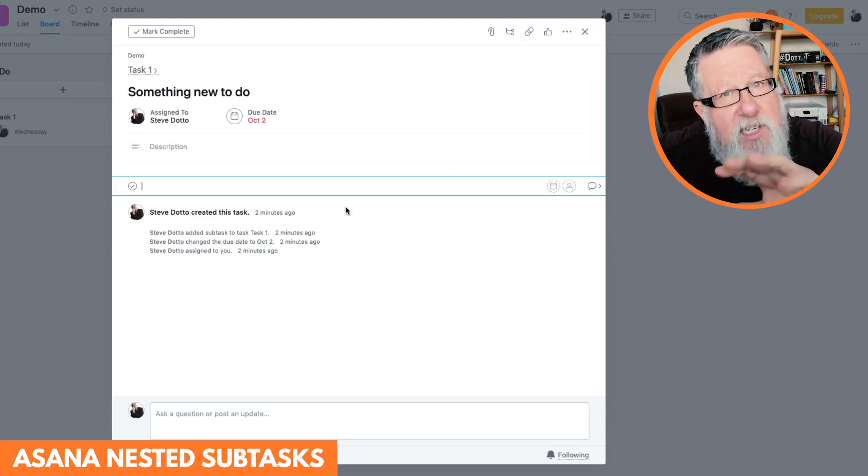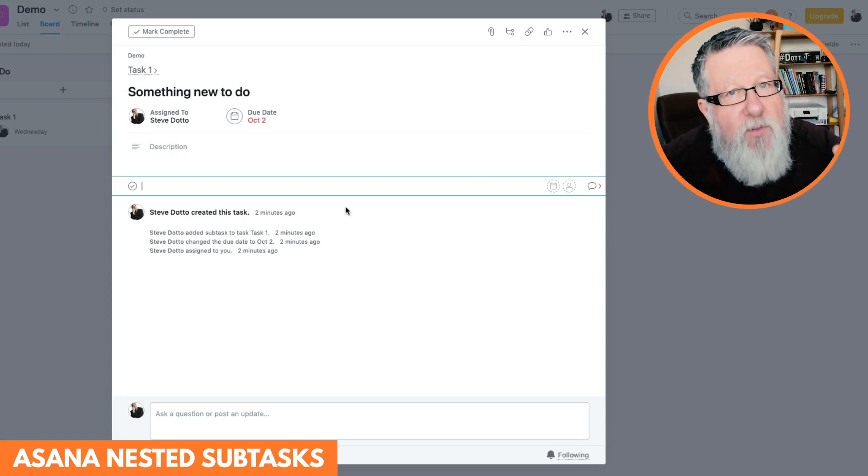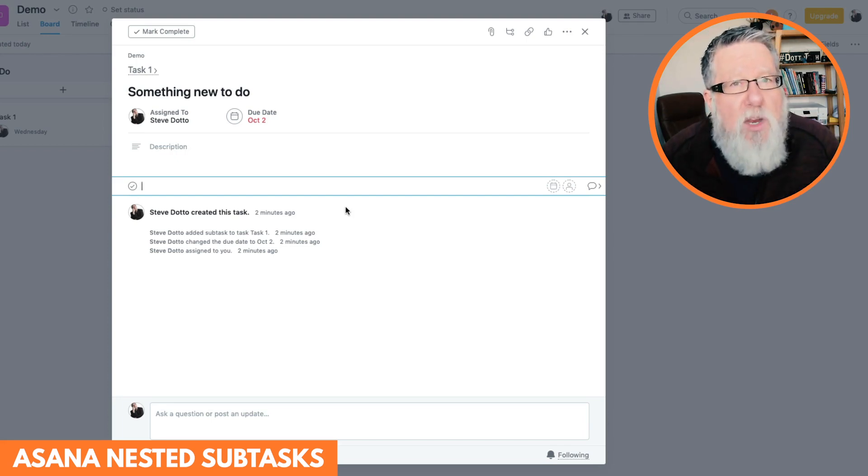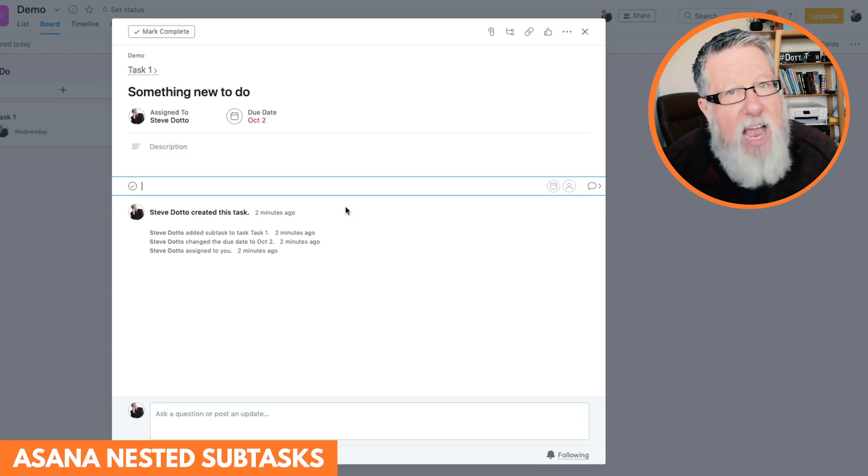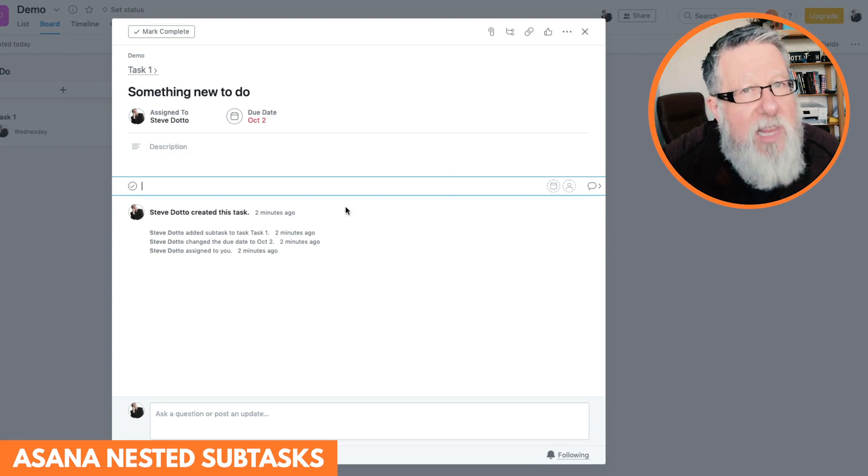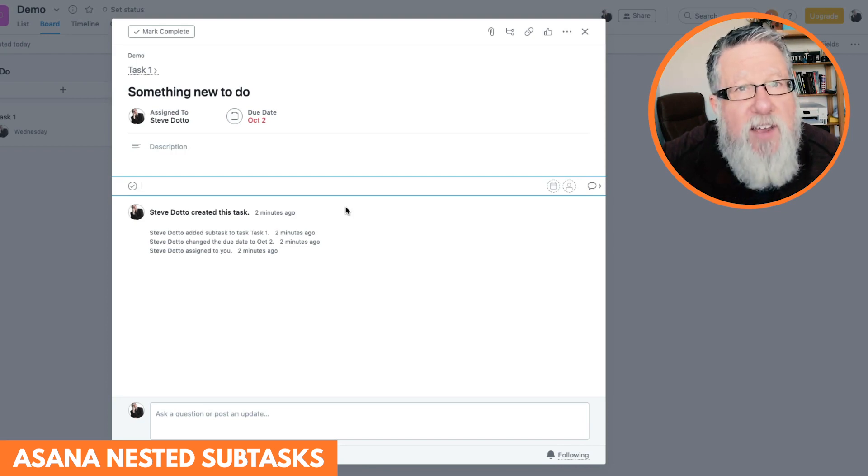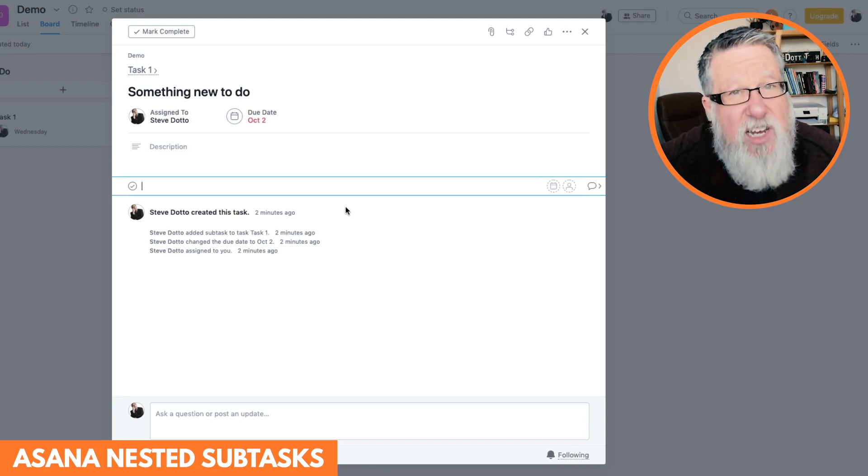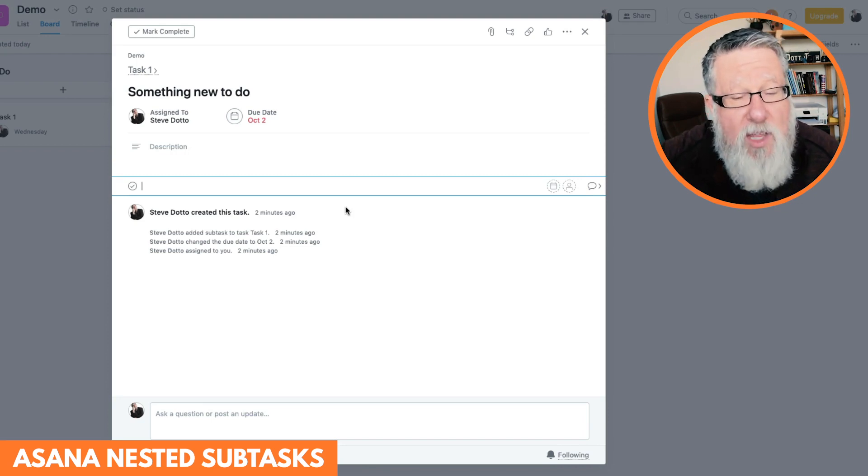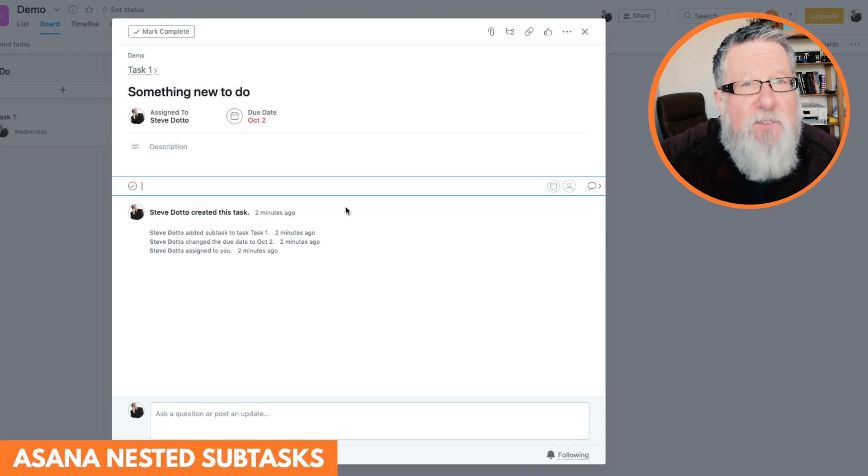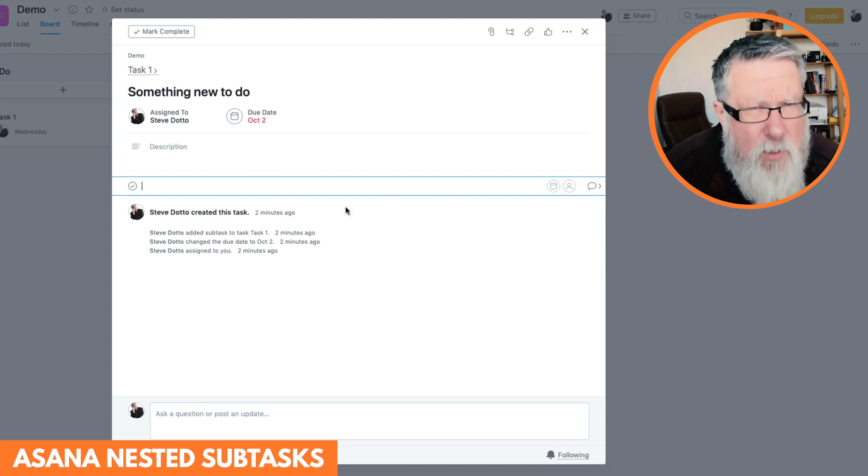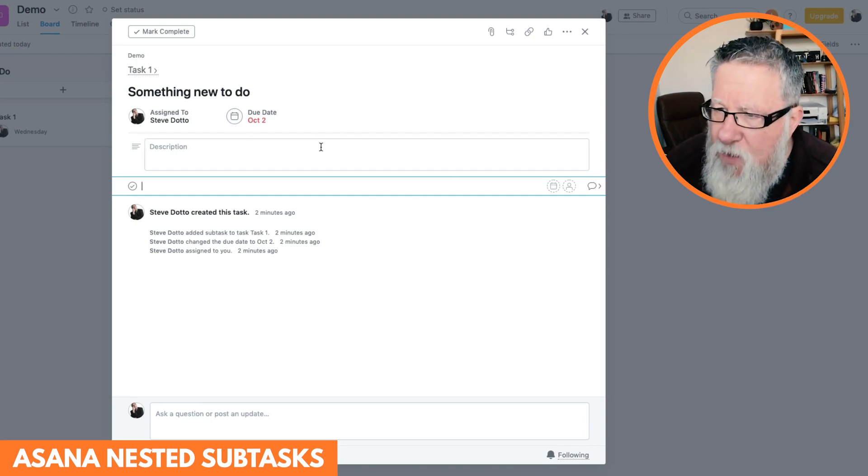And one of the things that you will consider as you start to use Asana more is creating templates, creating some of these tasks as templates, which have all of the structure of what has to happen. So for repeating things like a webinar that you put on on a weekly basis like we do, there's a series of tasks that have to happen each and every week. So we create a template of what those tasks look like, and then we create the specific items, the specific dates and related information within the template, within the task, after we've duplicated it.